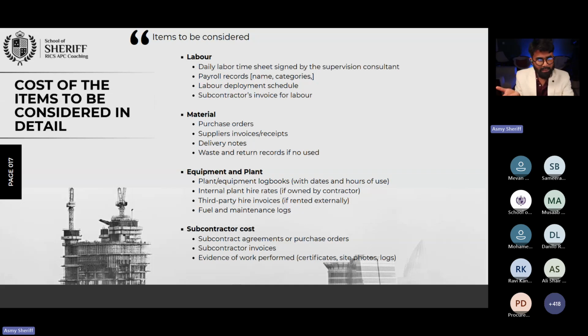So we asked a very simple question. Okay, you rented this, provide us a rental agreement. That agreement should be chambered by the Bahrain Chamber of Commerce. We requested him, and he dropped the claim. He dropped the claim. Why? All the machineries were his own machineries.